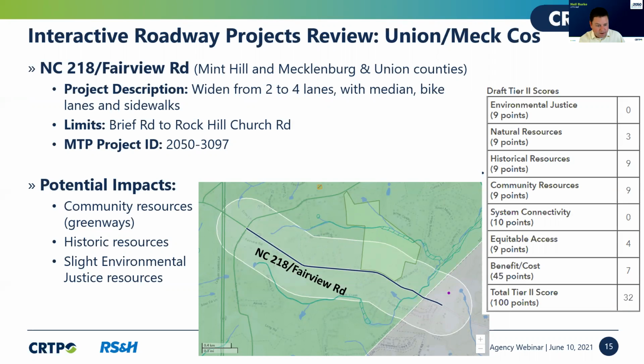Javier, this is Neil again. One piece of information I left out was the reason why we use the funnel. Every project that is submitted receives a Tier 1 score, but then we look at the available funding for the different roadway tiers, and then we cut off projects. So not every project receives a Tier 2 score. It's really only the projects that have a competitive Tier 1 score that we can afford to move into the Tier 2 process.